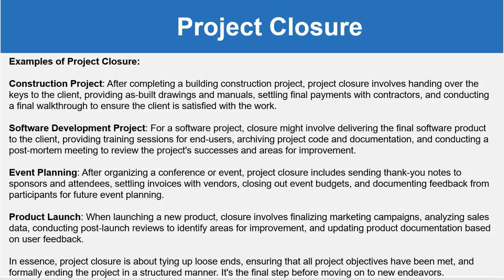For a software development project, closure might involve delivering the final software product to the client, providing training sessions for end users so that everyone is aware of the project, archiving project code and documentation, and conducting a post-mortem meeting to review the project's success and areas for improvement.